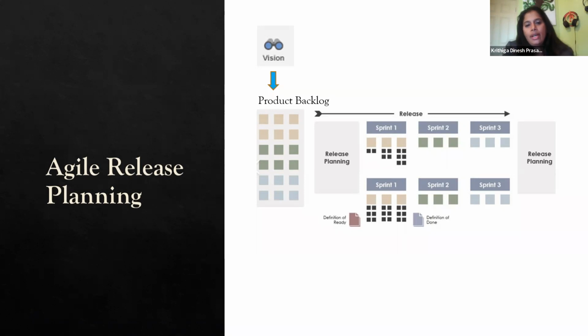what, like Charles said, we receive system requirements from a customer saying, hey, this is what needs to be developed. We have a system team, we have a software team, and we are collaboratively working with each other. And the other team might be agile, might not be agile. But let's say, just as an example, the software team is agile. So once we get the system requirements, we call it system aspects of software certification, and we come up with the requirements verification matrix at a high level, which the system engineer would be doing.